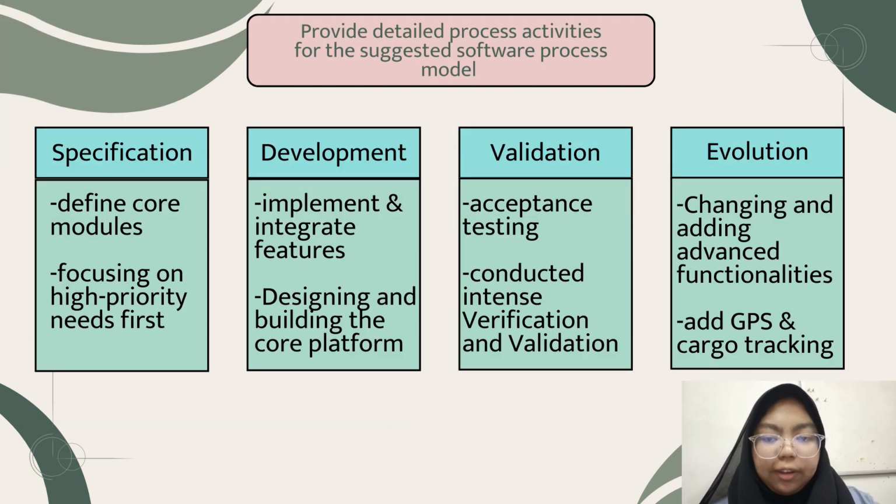4.2. First is the specification phase. In this phase, the focus is on defining requirements increment by increment, starting with the most critical features. For Buzz Asia, they first specify essential system requirements such as how the route search should function, what payment methods should be supported, and how users should log into the system. By prioritizing high-impact features early, Buzz Asia ensured that core services like login functionality, systematic route searching, and dynamic seat selection were clearly defined before development began.